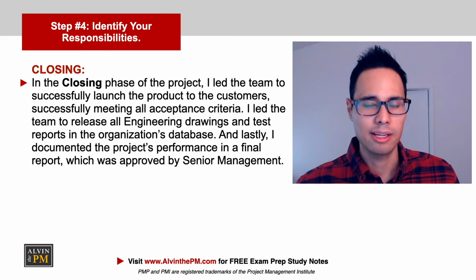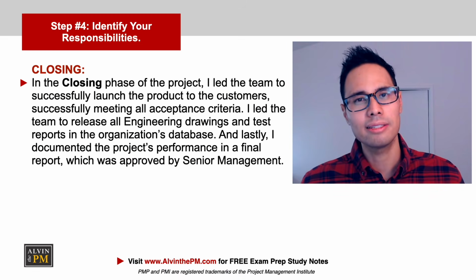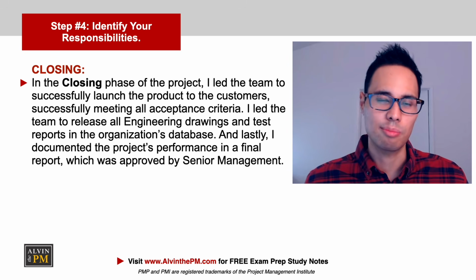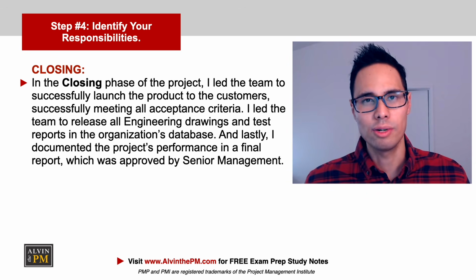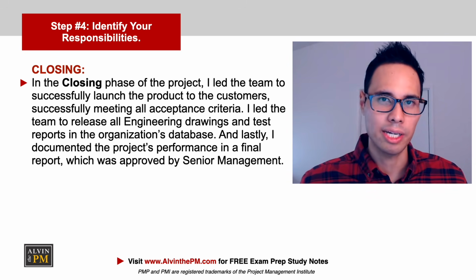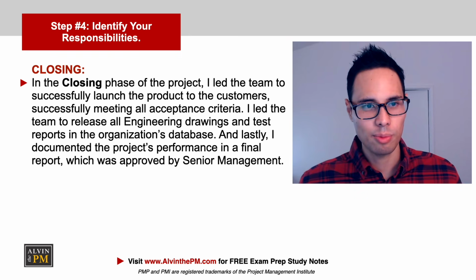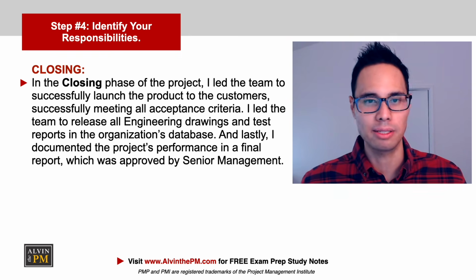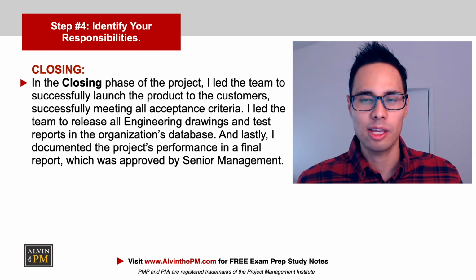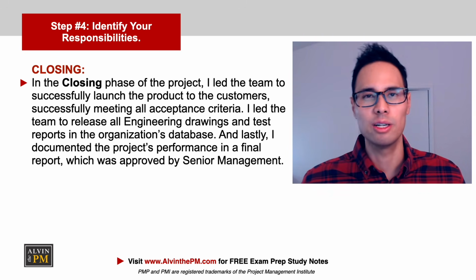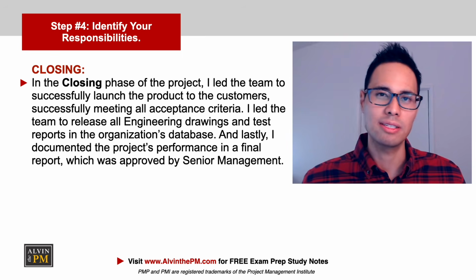And the last phase is, of course, closure. In the closing phase of the project, I led the team to successfully launch the product to the customers, which successfully met all acceptance criteria. I led the team to release all engineering drawings and test reports in the organization's database. And lastly, I documented the project's performance in a final report, which was approved by senior management.